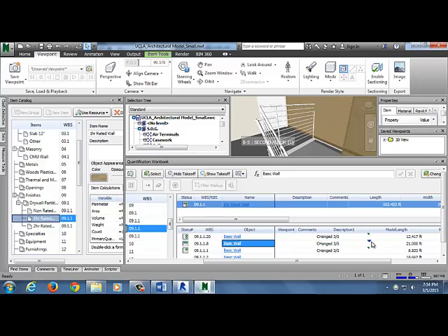So you can see, if you hover over here, I forgot to mention, but if you hover over each cell that changed, it'll tell you what the old and the new is, and the difference right there, right? And I haven't found a way for it to automatically give you, like when you export it, the delta column. So that's why I feel like it's a little clunky. I think it's going to get better. Like the next version should have that. But right now, it just visually tells you, and then you just have to update it, and then all you see now is just the new value.